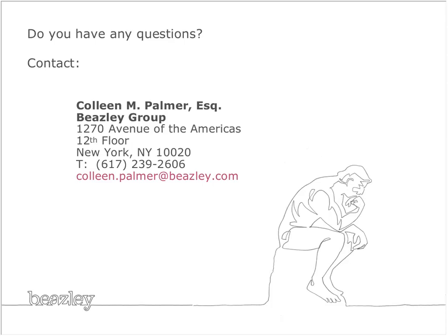But the additional issue with eDocs is that you want to make sure it's clear that hard copy controls, the electronic documents are just for informational purposes, and you're not giving a warranty that these things are accurate because of the fact that they can be changed because they are electronic. Okay.